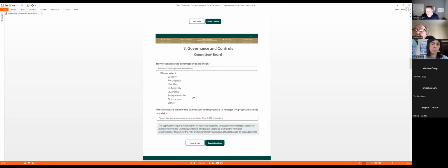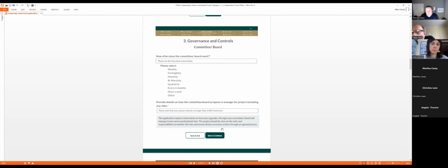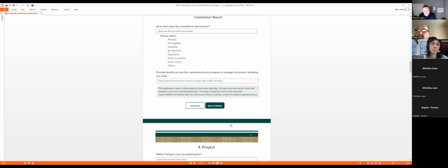Okay, really important. You're given 2,000 characters explaining that process. Again, it's very, very important. It's probably one of the more important questions they'll ask. So you can see here, the project should be clear on the roles and responsibilities to monitor risks and ensure timely corrective actions through the agreed process. Anywhere there's building works, you need to have someone sign off on the building works done. That has to be a professional, an engineer or architect. Okay, so you can't do that yourself, you're not qualified to do so.